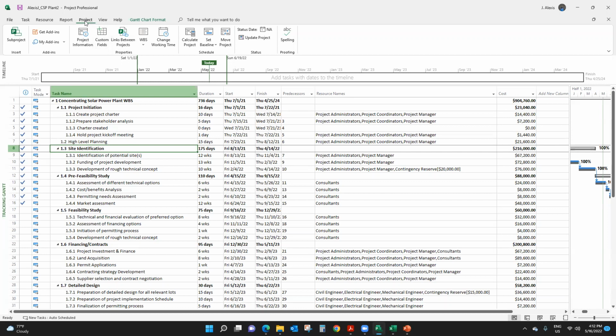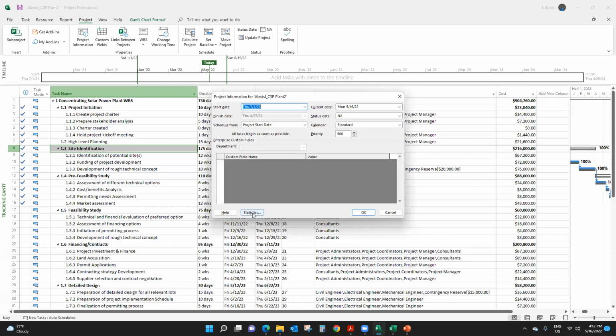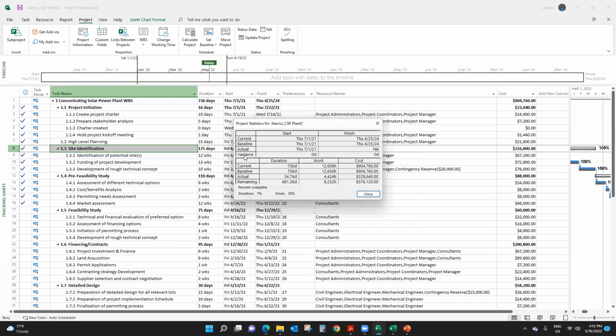If actual values and planned values are not the same, this is when you're going to see a variance here. So the variance is going to be your gap between your baseline and the actual values in your project plans. That's where you check this information.